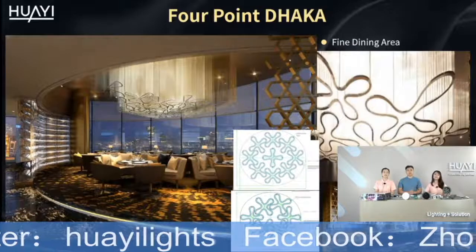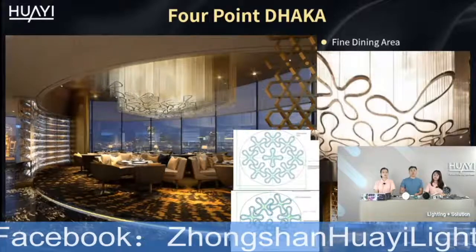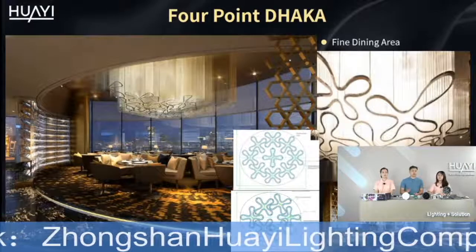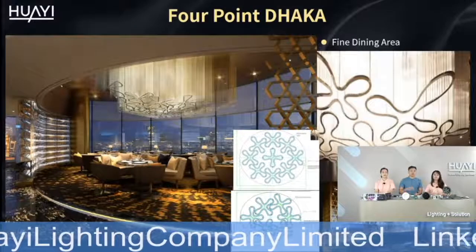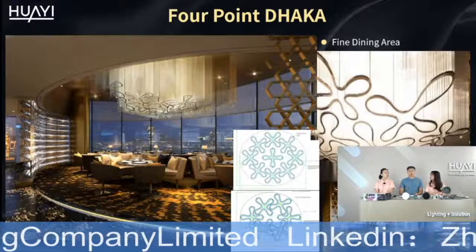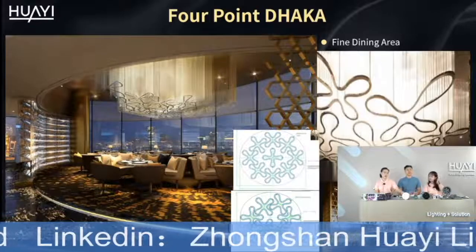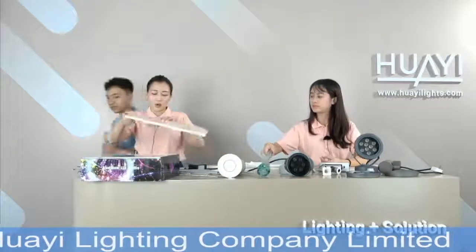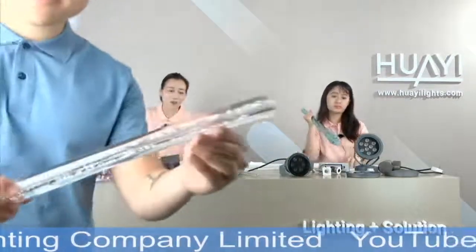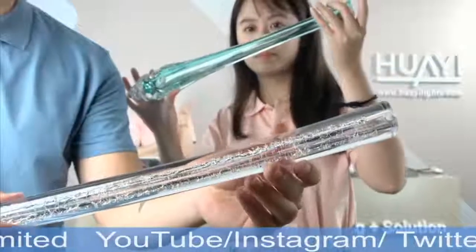All the process is under strict quality control before production. We arrange the shop drawings, which will not only show the shape and the material, but also the installation details. Before dispatch, installation checking is also needed, even if not for all the products, but the main parts must be included. Today we also want to share with you some glass samples. Even if it's not exactly the one we use in this project, we share with you some patterns we have now. So if you already have a concept of which kind you want to develop, we will also support you with the actual samples for your checking and approval.